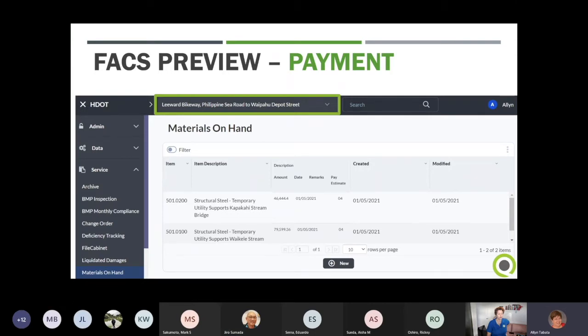Okay, so anyway, this is the area where you would enter any kind of materials, where you have receipts. It's very similar to the work reports. So that's why you see the selection of pay item, and you enter these amounts in the active sheet. I'm just kind of showing you what was entered in one. And then there's also an area where you can upload the receipt itself.